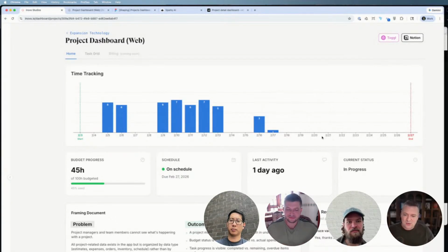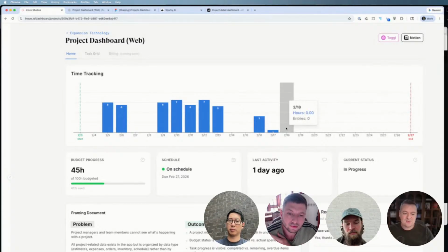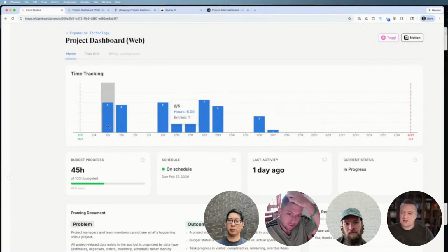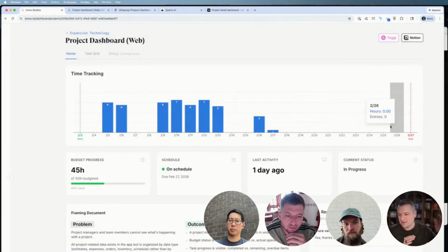One thing that we've been fighting for, because this is a 4-week project, is that we 100% have to be done with this thing on the 20th. This means they've gone through 2 or 3 rounds of fixes on it. What we don't want to do is deliver this first version to the client in the last few days, they have a day or two to look at it, and then we end up with a massive list of reactive work in March for this project, and now we're cleaning up March for stuff that should have happened in February. And so these are things that we want to tighten up.